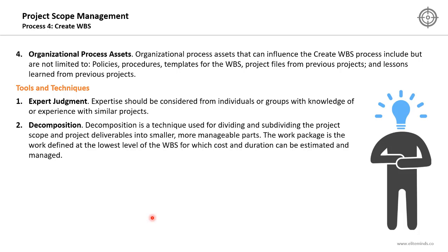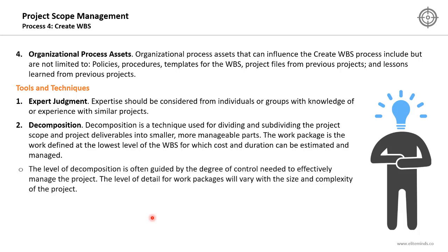Decomposition is a technique used for dividing and subdividing the project scope and the project deliverables into smaller, more manageable parts. The work package is the work defined at the lowest level of the work breakdown structure, for which cost and duration can be estimated and managed. So decomposition is about subdividing the project deliverables into smaller, more manageable parts. You will keep decomposing till you reach the lowest level, which is the work package, for which cost and duration can be easily estimated and managed.